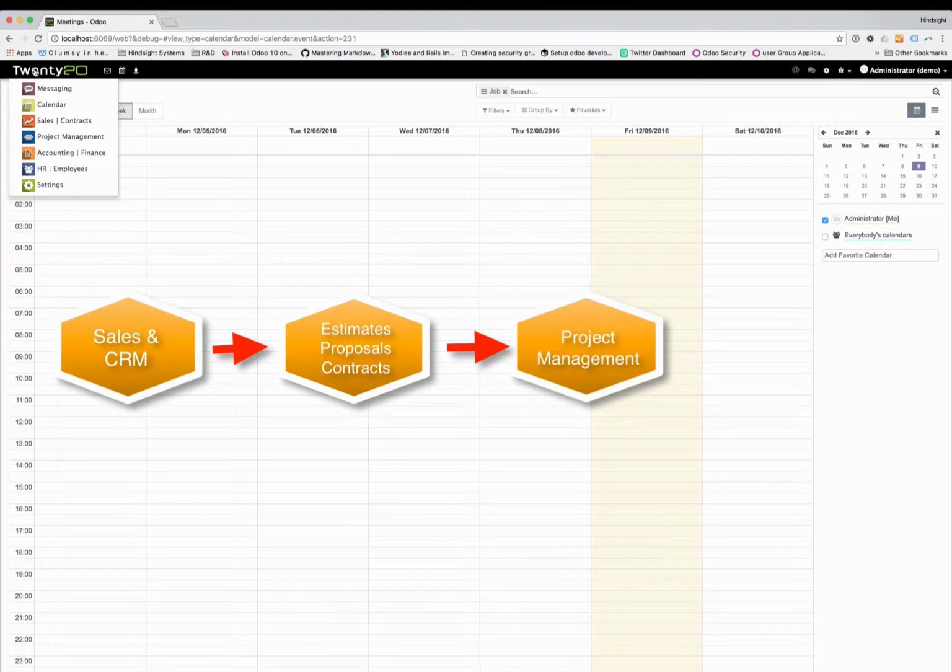From an accounting perspective, we're also keeping track of the subcontracts, the commitments, subcontracts and purchase orders, and all of the invoices that we've received against those. And then from this information, we can pay our invoices to our vendors and subcontractors, obviously, and send applications for payment to our customer to receive money on our projects.